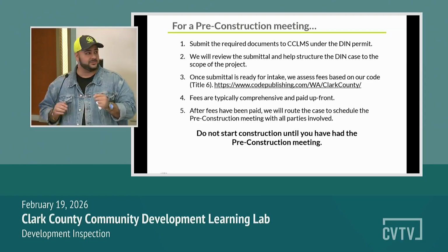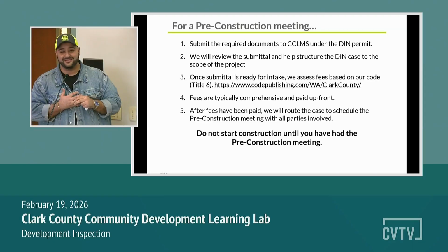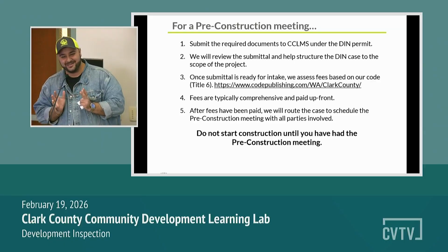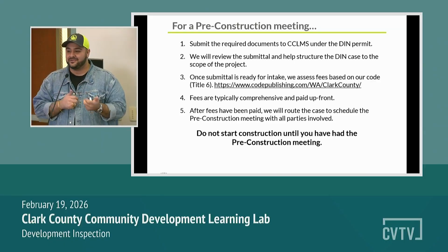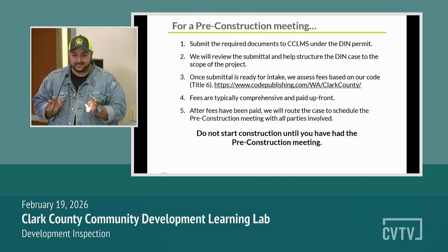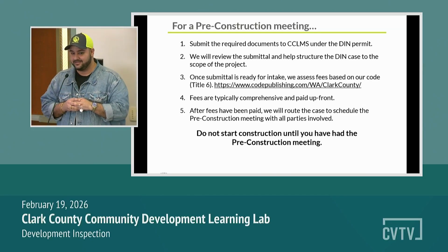And this is one of those, you can see it in bold, do not start construction, please, until you've had the meeting with us. You know, a lot of folks make the mistake thinking that the engineering or their grading plans are approved. Please do not break ground, do not play in the dirt until we give you the go. Okay, it's very important.